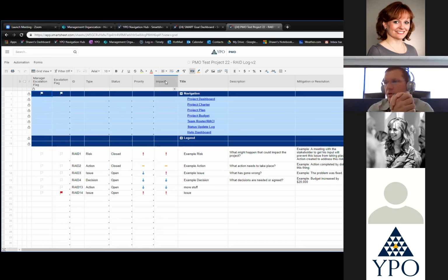If you just do it in project minutes, meeting notes, and stuff like that, those meeting notes get sent out in emails or get lost or whatever. You could keep your meeting notes here if you wanted, but I tend to keep all my action items here and they never get lost. So as things get added, I'll add an action item. So if someone says something on a call that we need to track and make sure it gets completed, I'll put it on here. I'll say it's an action item.